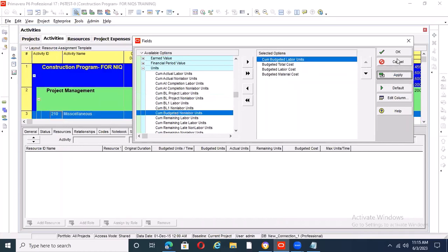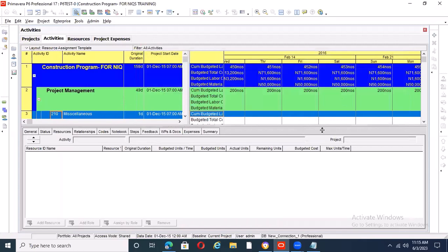So this one gives you your cumulative, but it's only going to calculate your labor units. Your cumulative is at the top. So this cumulative is only calculating labor, so there are some places it might be empty. This one is just giving you your total cost for each day. So when you export now, you only use Excel to do your cumulative.